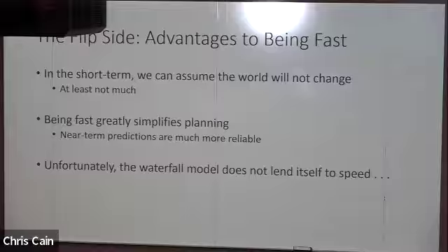So if you're aiming to have faster deliverables, then the planning is also a lot simpler. You don't have to design the entire project from the very beginning. You design, what is the very first prototype deliverable? What does that look like? And you ask the client about the very first prototype deliverable without worrying about all of the frills that they're going to want by the end of the project. You hone in on what is the easiest first thing that I can implement and give you so that you can give me feedback.